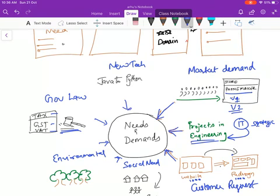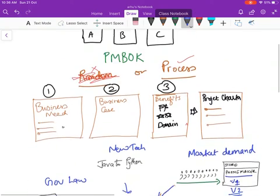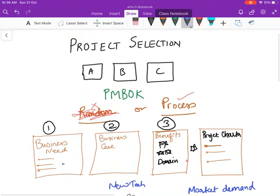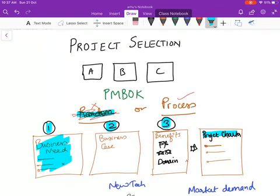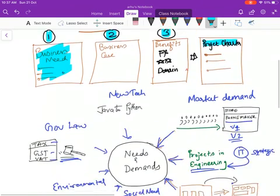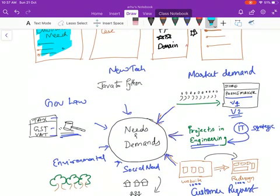So market needs and demands could come from any one of these. So let me just summarize this. This is very important for a PMP examination. Understand that projects are not selected randomly. There is a process to select projects. It starts with a business need. Then a business case is created. And then the benefits are realized. And then a project charter is created. How the business need is uncovered. Needs and demands are uncovered in many ways.